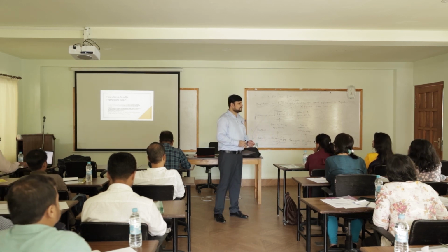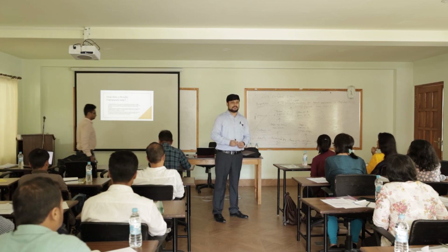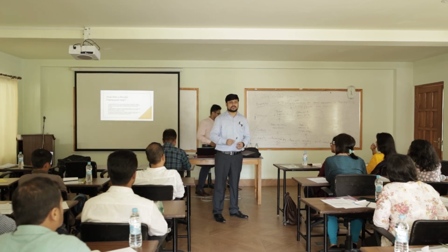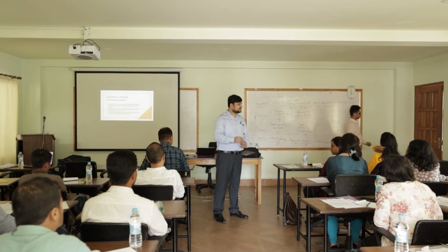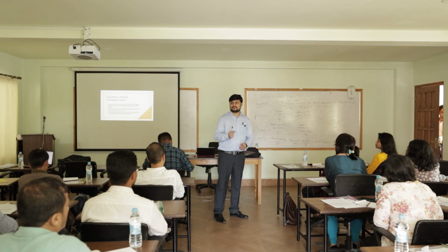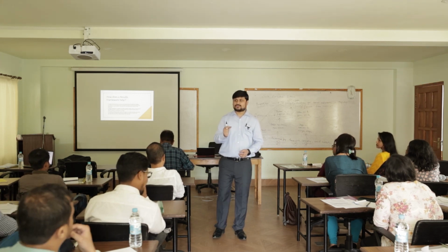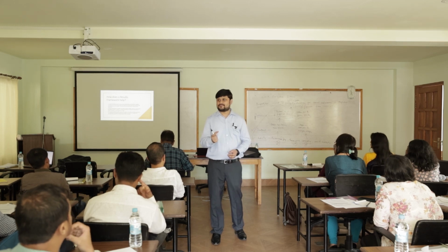So for example, in the first month, only 10 counseling sessions must be done. In the second month, it should increase to 30. In the 5th month, it should go to 100. What are you trying to do here? You're trying to set some targets for the program team so that they work accordingly.